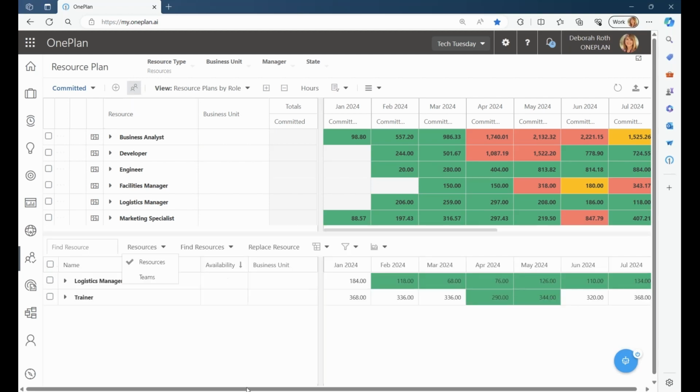So this candidates list is going to be a summary of the organization's named and generic resources, all of them, along with their committed hours and overages, and how you can assign them in real time to your plans over a given period. This candidates list, as Tina mentioned before, is a key and integral part of how you interact with the resource planner to build, analyze, and modify the resource plans in real time for that visibility. And it's how you're able to shift the allocations to balance the workload against the resource availability. And again, we see some of the roles or the skill sets that we're able to allocate to.